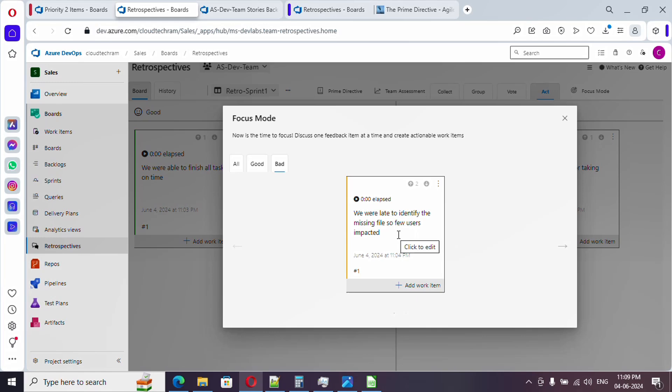Here it is listing out one item. We were late to identify the missing files so few users were impacted. How we can overcome it? One team is suggesting that we need to have an emailing mechanism. It needs to keep on looking for the particular folder, and once the file is not available at a particular time, we need to get an email. I am going to create a task for it.